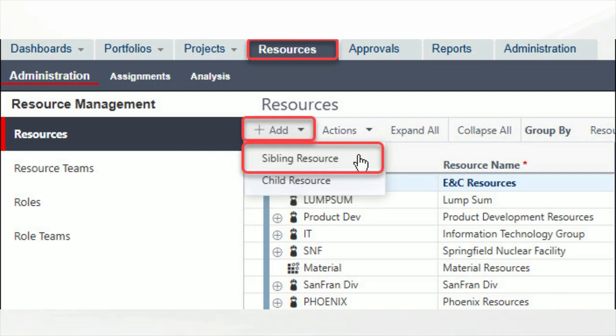This should read selected. The following blog, Fixed Price Costs and Primavera P6 EPPM, describes how to include fixed price cost loading in P6 EPPM schedules using a cost user-defined field, UDF. The disadvantage of this UDF approach is that the fixed price cost UDF is not included in the planned total cost field computation. Another lump sum cost loading approach uses P6 Professional as before, but this time, we assign a fixed price cost directly to the budgeted labor and non-labor cost columns.